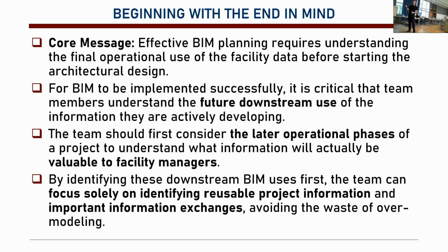Good. Yeah, operation phase. The thing is that we want to know how the information will be used in the future, and what we can do there. In that regard, for instance, facilities managers should be coming to the project in advance to tell us what they want, what they need. Like, I want the maintenance to be easily done.